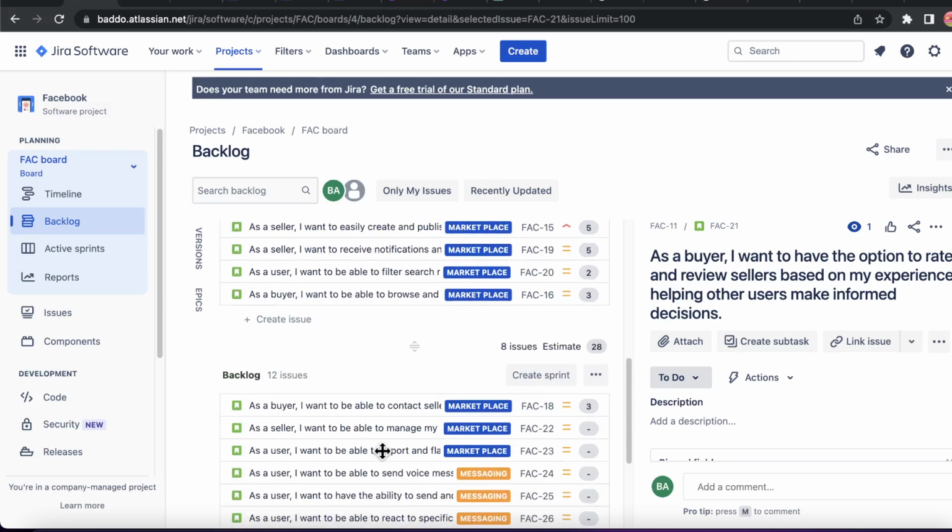I said if you want a healthy backlog, you are going to make sure that you have the descriptions and acceptance criteria. Acceptance criteria is very important. Never start any development without acceptance criteria if you don't want any confusion, because the acceptance criteria exists as, let's say, a contract between you and the product owner. So don't just say he said it and I did it. No, he said it, document it.